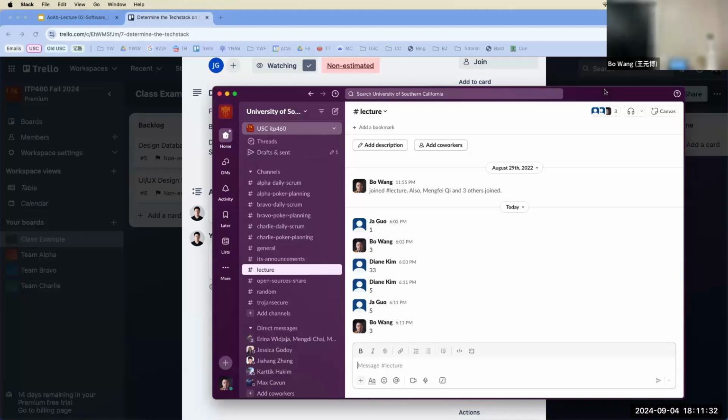Each group can make up a small fun penalty for someone who did it wrong, especially the Scrum Master, right? Make him eat a spoon of hot sauce or something. Just kidding. But anyway, I think it's number 3, and they think of number 2 and 5. And then we talk about why we think about it that way, right? And we finalize it, and we assign it. We're not going to repeat that one more time, but this is how you do the sprint planning. See that? Good sprint planning will save a lot of your time. Trust me.